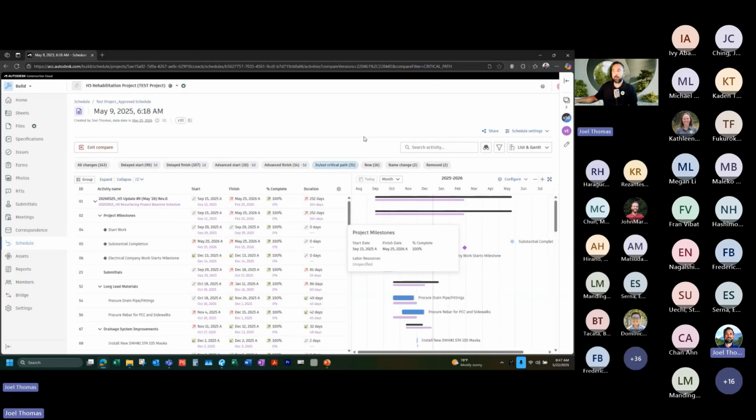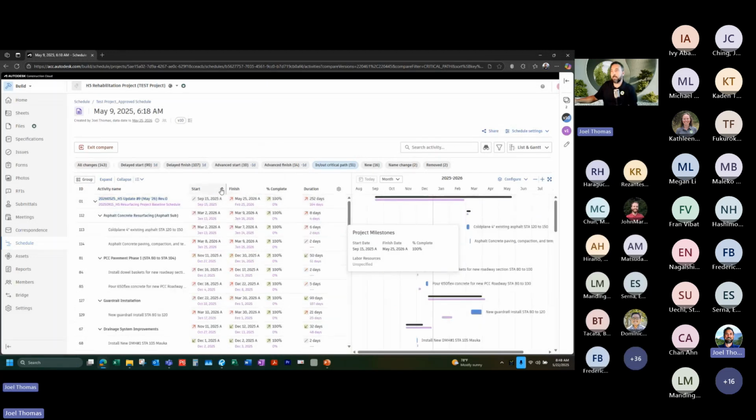This is how I'm going to find my concurrent delays. Looking through this, anytime you see these little arrows, it's telling you this date pushed beyond what this showed. Black lettering here is the as-built schedule, so the final, and then the pink is the first schedule. Looking through this, you'll see all these carats, and these are more like the bigger buckets of activities. I'm just trying to find these actual activities and see where there were differences. And I would make note of all of these delays where we had some shifts.